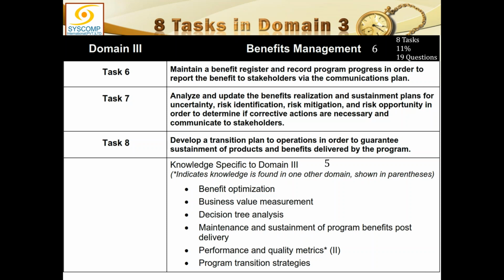The biggest plan is the program management plan, which comprises of the strategic management plan, the benefit management plan, the communication management plan, the risk management plan, the schedule management plan. So program has got a number of knowledge areas, each one of them has to have a management plan, and these management plans are put together to form the program management plan, just like project management.